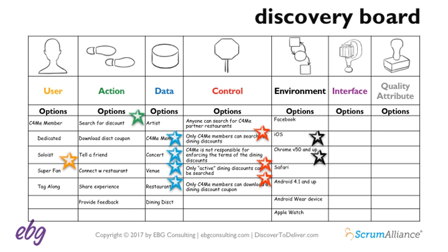Now, oftentimes for this particular dimension, there isn't much work to do here because there isn't much optioning, because if you're in a large organization, you're usually going to have a prescribed set of hardware and software platforms that you're going to use. But I don't skip the dimension, even if it takes you 3 minutes, because we have seen multiple situations where multiple teams working on the same product make erroneous assumptions about the platform. And that's, of course, a particular risk in a distributed environment. So you don't want to skip this.